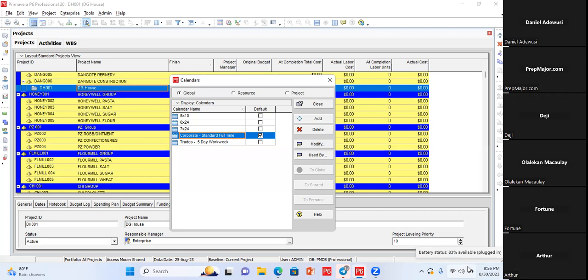If you assign Omolola to each of these tasks, Omolola will only be able to do B and C because she doesn't work on Monday. It will be done on Monday, it will be done on Thursday, it will be done on Friday. She can only work 16 hours a week, even if you have a normal calendar that says, okay, this thing is Monday to Friday.